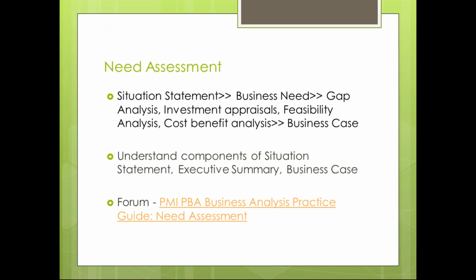So here I've just listed a few points. The situation statement is the first thing that will be built. Then comes the business need. Then we might proceed with the gap analysis and the investment appraisals. Investment appraisals include a basic cost benefit analysis, but not exactly a cost benefit analysis, because a cost benefit analysis will be a detailed one. Then the feasibility analysis, considering the time, scope, and these kinds of constraints with respect to the options available.